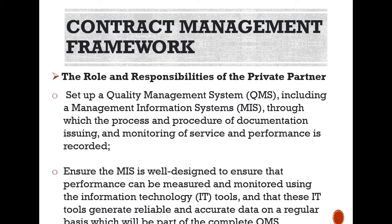The role and responsibilities of the private partner include setting up a Quality Management System (QMS), including a Management Information System (MIS), through which the process and procedure of documentation, issuing and monitoring of service and performance is recorded. Ensure the MIS is well designed so that performance can be measured and monitored using information technology tools, and that these IT tools generate reliable, accurate data on a regular basis, which will be part of the complete QMS.